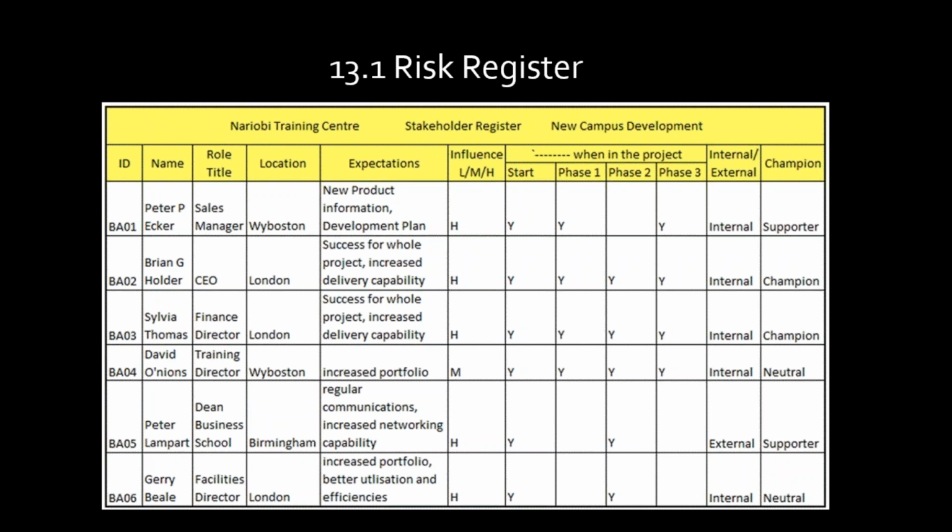Here we're starting to find out who our stakeholders are, what their level of interest on the project, what their level of authority is on the project, at what points in the project they might have more interest than others. Things like this that we want to know about our stakeholders, all right? Here we're also going to want to know their communication needs, because I'm going to show you the other process, communications management. We're going to start asking them their needs here in the register so that we can put a plan together that caters to those needs.